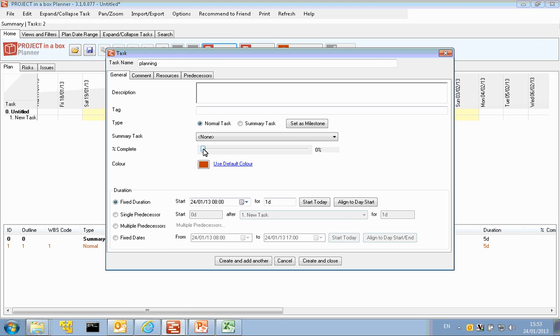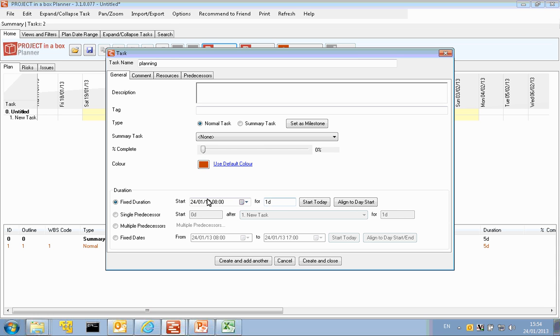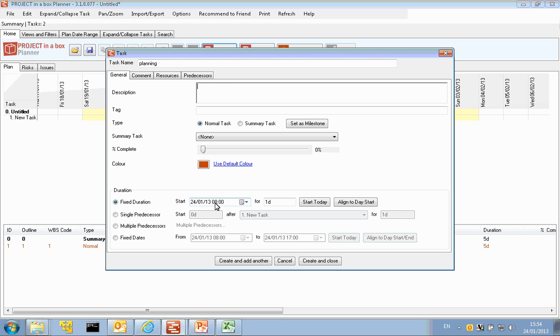We don't have any percentage complete activity to record at the moment, so we can come straight down to setting the duration. We have four choices here for setting the duration. The first one is to pick a date and a duration from that date, and looking at the calendar, it would then determine what the end date of that task is based on the number of working days or hours in that period. We can enter our duration in hours and days. We can also enter our start date in hours and days, either at a particular time or at the start of the day. Often, that's what we're interested in doing, bringing it back to the start of the working day as set in the calendar. This calendar is using an 8 in the morning to 5 in the evening working day.